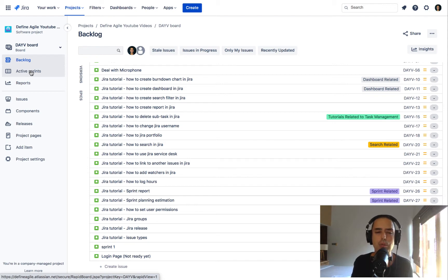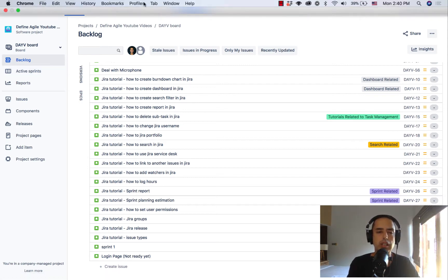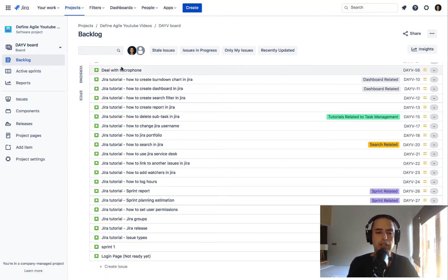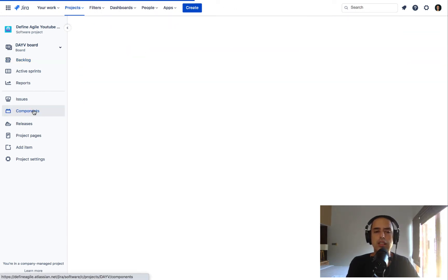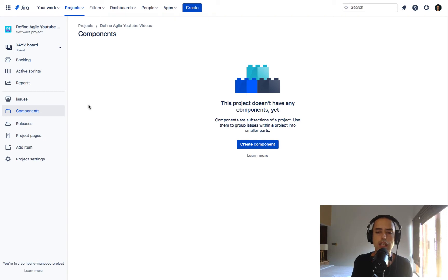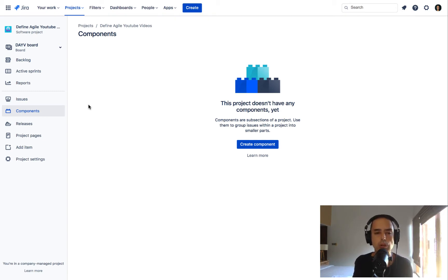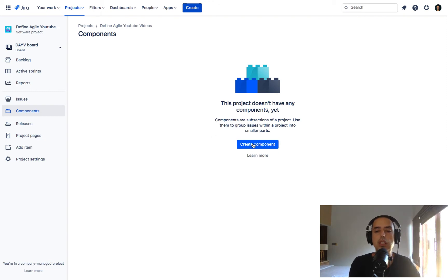Now let's see how we can create components in Jira and what are the components. First of all, to create components you go to your project. Right now I'm in a scrum project and there's a components tab right there. I click on it and I can go to components. Components, as it says here, are subsections of projects and use them to group issues. So we used to group issues by epics but we also can group issues by components and we can do some very cool things with components.